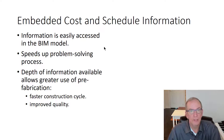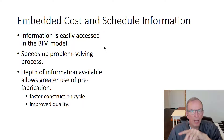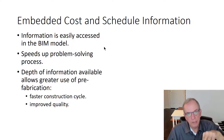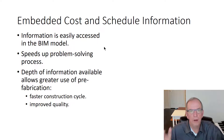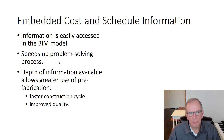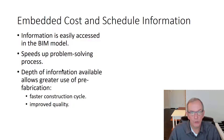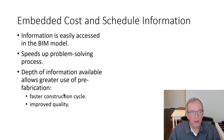You can do a lot of different things in BIM models. For site logistics, you can have the actual concrete trucks, excavators, and dump trucks moving along in the model, showing the turning radiuses and seeing how much available space you need. You can work a lot of these things out in the model — it speeds up the problem-solving process and the ability to gather and utilize information, as we talked about in the previous lecture 10a on productivity software.